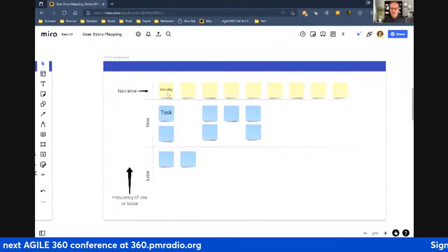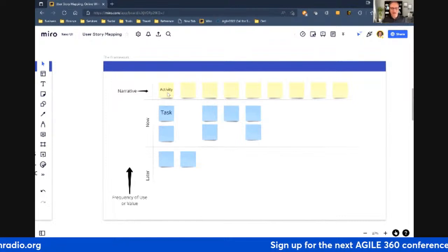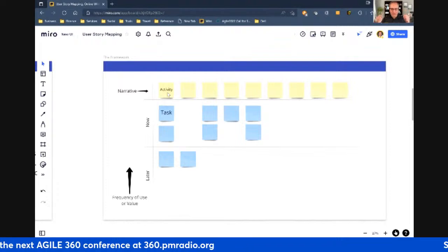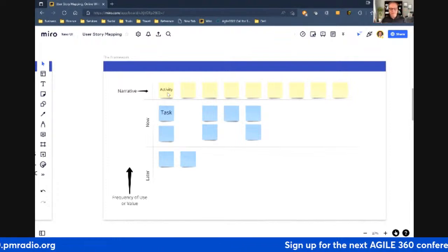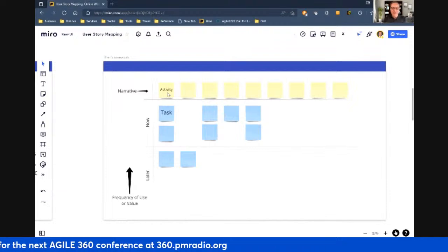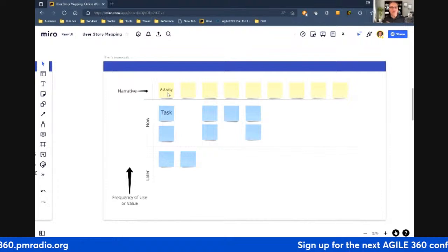I haven't talked about functionality really. I haven't talked about the user stories. I'm simply saying this is what I would go through, my scenario, my behavior as I'm using the product, right? So we want to visualize how the user will use the product, and you put those steps across the top. Now, if you have a very complex system, very large system, then obviously the story map is not going to be able to handle every single workflow in your system. So we'll do multiple maps, for different areas of the product or different areas of workflow.